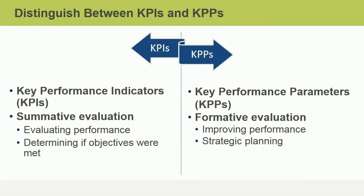There are two basic ways of using performance indicators. We can use key performance indicators or KPIs to think back on what happened in the past. When we look backwards using a summative evaluation, we're able to evaluate the performance of the project, identify variance between that performance and the plan, and determine if objectives were met.